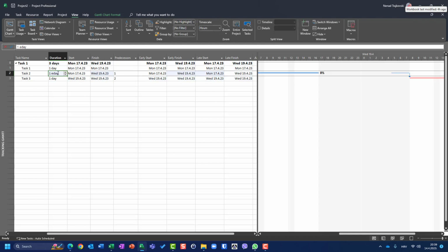So basically, this task has slack, and slack is here. Because it's elapsed, it is not concerned about those gray areas, which mean non-working time. So that task can last longer. How much? Exactly from 5 p.m. to 8 a.m. Hope this helps. Thank you very much.